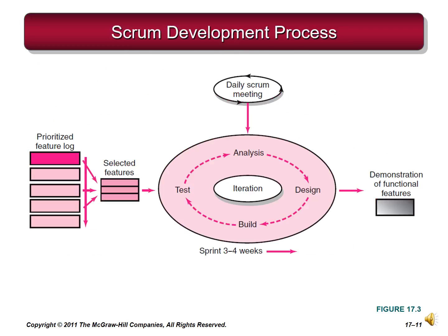Specific features are created according to 4 distinct phases within Scrum. That is, analysis, design, build, and test, as you can see in this figure. Each feature can be thought of as a mini project in itself. The first phase is analysis and review of functional requirements that will be needed to complete the feature. The team commits to meet these requirements.